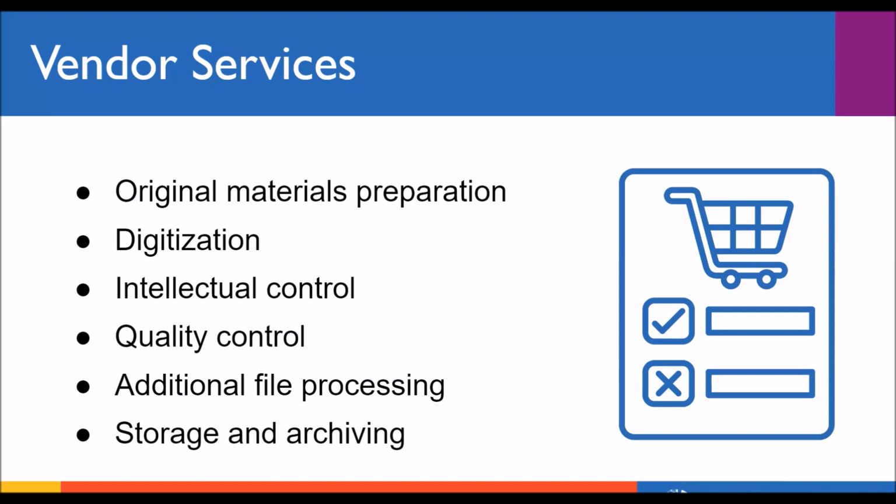When you're putting in your RFP, you can often ask for a sample if they do any sort of item level condition reporting to be included in that. And that gives you kind of an idea for the type of documentation you'll get back. And if that's sufficient, if it's the right information, but you want it in a different format, usually vendors can work with you based on what your needs are.